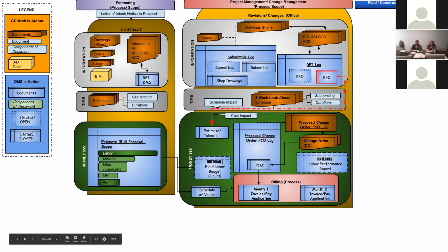So this component is what I've been hearing Chelsea refer to, is we want to be able to get change orders. So if we were to work backwards, the billing cycle traditionally starts, they want information by the 20th of the month. Today is the 7th. So 13 days from now, they're going to want to know what we're going to be billing. Between now and when they ask for our billing is the critical time for us to get these PCOs onto change orders and get the change orders incorporated into this month's billing.